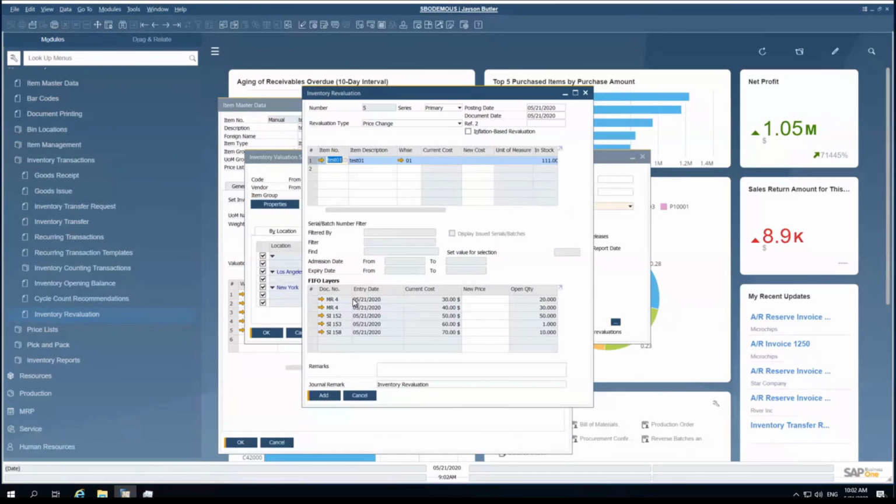That's another question. In the Gantt chart, does moving one of the stages result in moving the next automatically? No, you will need to define it, because there is no relation between the stages.